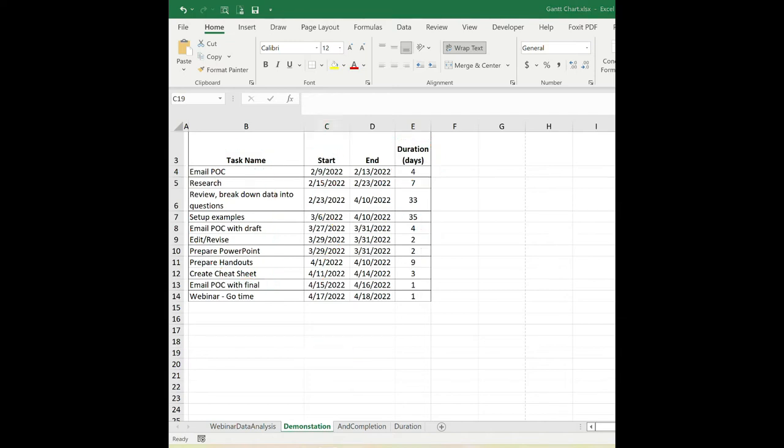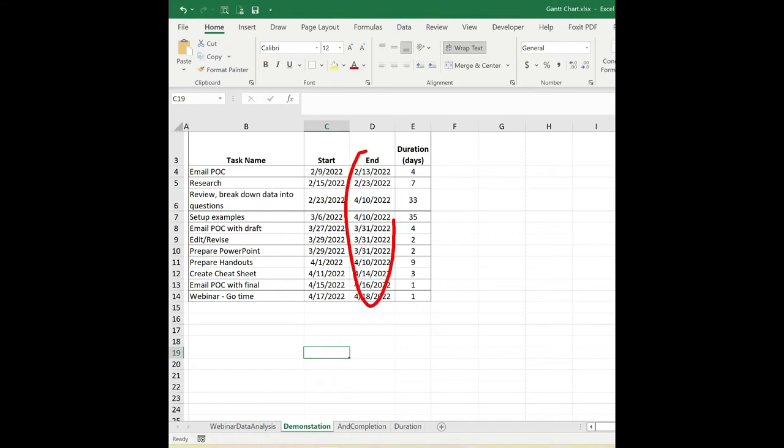In this example, I am putting together a webinar training for a client that I have. So I have each task listed with the start date, end date, and duration. So you don't actually need to have this end date for the Gantt chart, but it is nice to be able to have that to calculate the duration.